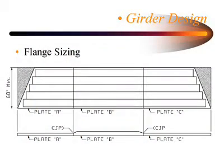If you must change the flange width, and sometimes you do, try to do so at a bolted field splice where it's not going to impact this whole fabrication process. And again, allow fabricators to eliminate a splice within a shipping piece. Show that on the document, on the bid drawings. Let the fabricator make that calculation. Is it cheaper for me to just run the thicker material to the end of that piece and save the whole welding process? A couple of states actually make that statement in their bid documents that a fabricator can do that without even asking permission.